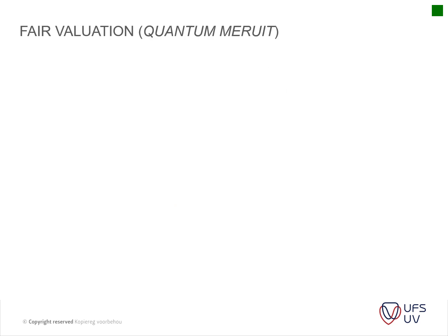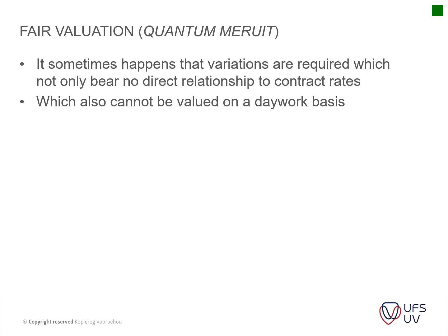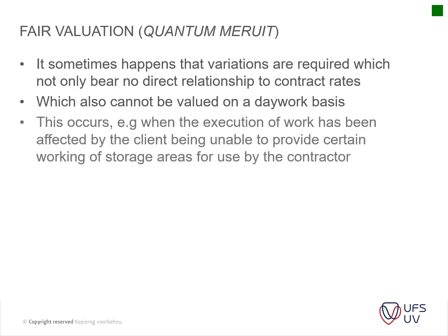Okay, fair valuation. Quantum meruit. So it sometimes happens that variations are required which not only bear no direct relationship to contract rates, and which also cannot be valued on a day work basis. Okay, so this occurs, for instance, when the execution of work has been affected by the client being unable to provide certain working or storage areas for use by a contractor.